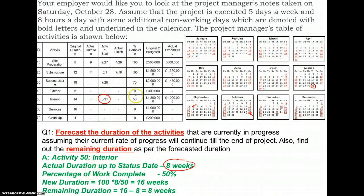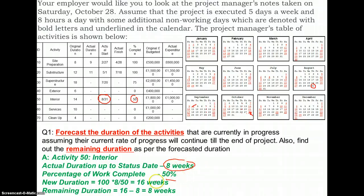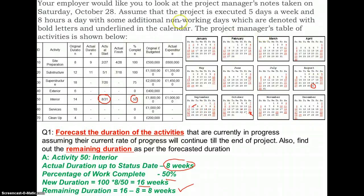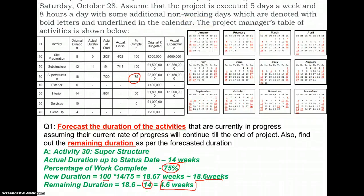From the project notes, 50% of the interior works activity has been completed. This means 50% of work was completed in eight weeks, so it would take an additional eight weeks to complete the remaining work. The remaining duration is therefore eight weeks from the reporting period, which is 28th of October.